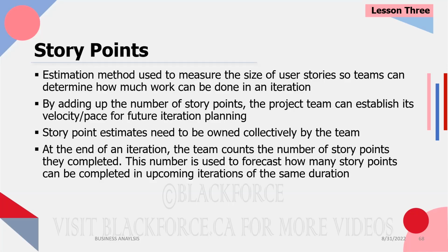Okay? But the bottom line is that they will assign a point to every user story, and then they will add up all those story points. They're called story points, points of the user story, right? Story points. The project team can then establish its velocity for future iteration planning.